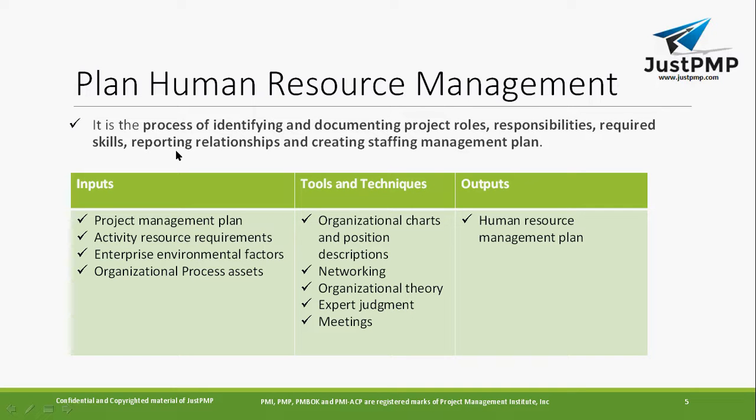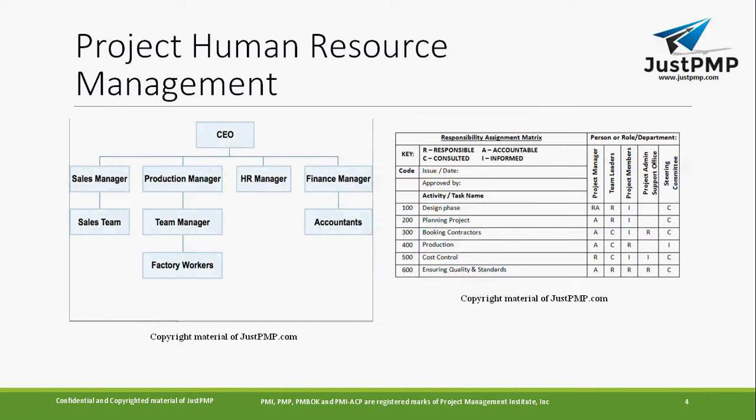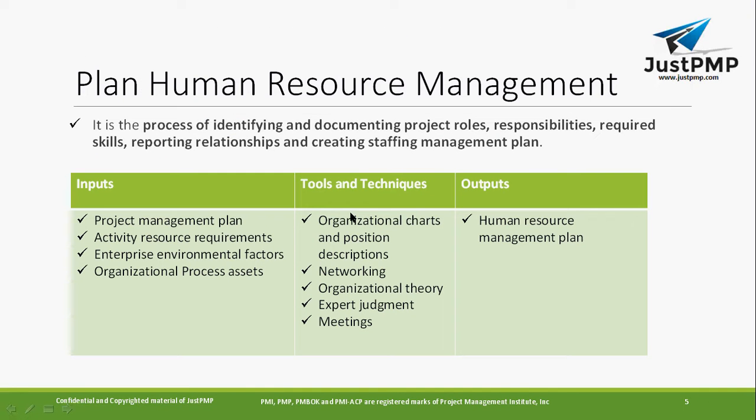What will the reporting relationship be? How are those people hierarchically linked? You can create your reporting relationship diagram there, and then create the staffing management plan. So how those resources will be acquired, or maybe you can hire them, or maybe within the same organization you can do advance booking of those resources. So you can create a staffing management plan. That is what you're going to do in Plan Human Resource Management.